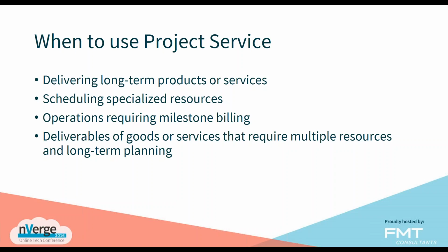Now, when we actually look at the milestones within our projects, we're able to set up contractual billing. This gives us the advantage of being able to define at what stages we're going to actually be expecting payment for the services provided as we go through, say, a 6-month-long engagement, delivering all the different aspects to one of our software solutions.